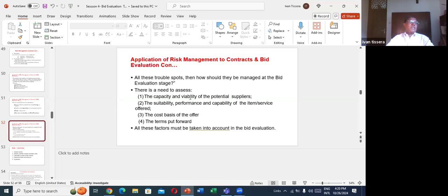We require some information, even though he is selected as the lowest. We check their evidence and we verify the evidence also. For example, even though a bidder says I have the financial resources or cash flow to do the contract, at the time of contract award he has signed another contract. Then he has no financial capability. So the committee should check his latest financial information to understand his financial capacity, right?